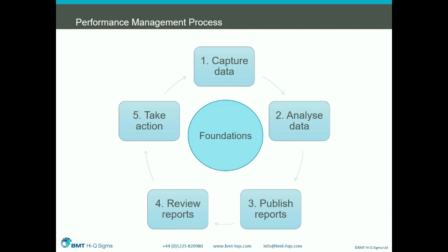Without those foundations in place, you won't be able to truly measure the performance of your project. So once you've got those foundations in place, you then need to capture the data as you go through your performance measurement life cycle. So looking at the schedule that you've got, capture the data of the risk register. You then need to analyze that data, so you actually need to do something with it. Once you've analyzed that data, provided some thoughts, then you need to publish the report.